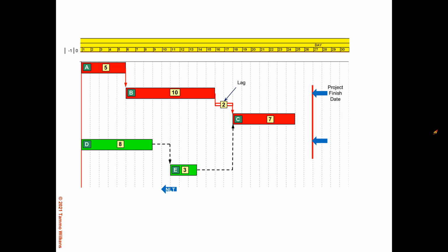So now let us look at this situation. Again, we have a project finish of day 26. That's when the client wants it. And we do our forward pass calculation to get the early dates, just as before. Now the backward pass calculation starts on day 26.